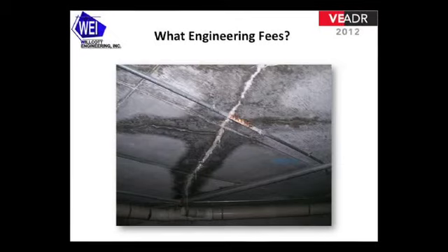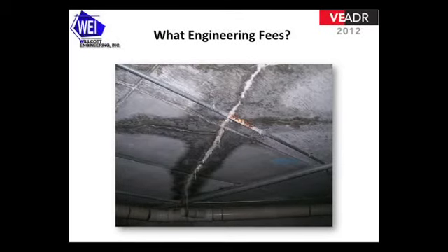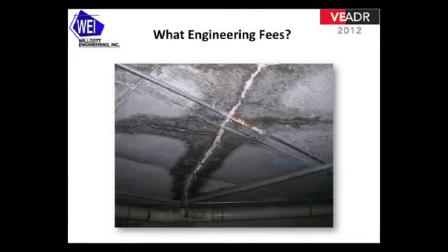Professionals were involved in looking at that on behalf of the owner and insurer, and the ultimate expense toward that effort was $1.8 million. It involved selective expansion joint waterproofing repairs and improvement of the drainage systems. There was no line item for field engineering or course of inspection work. So the work proceeded, contractor self-performed it, and at the completion of the work, leaks arose.